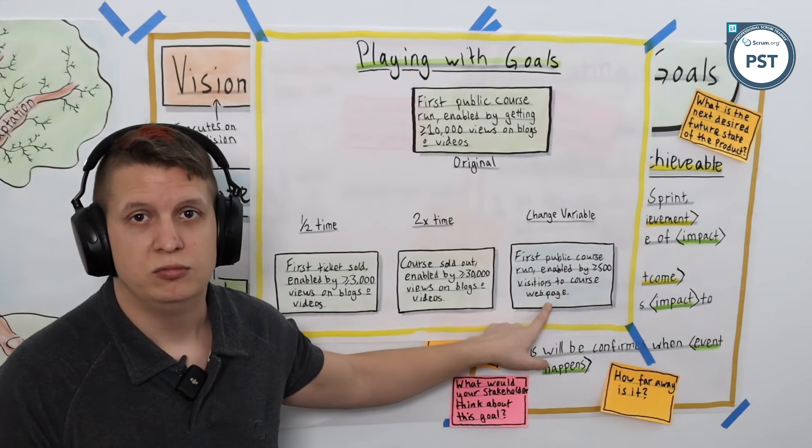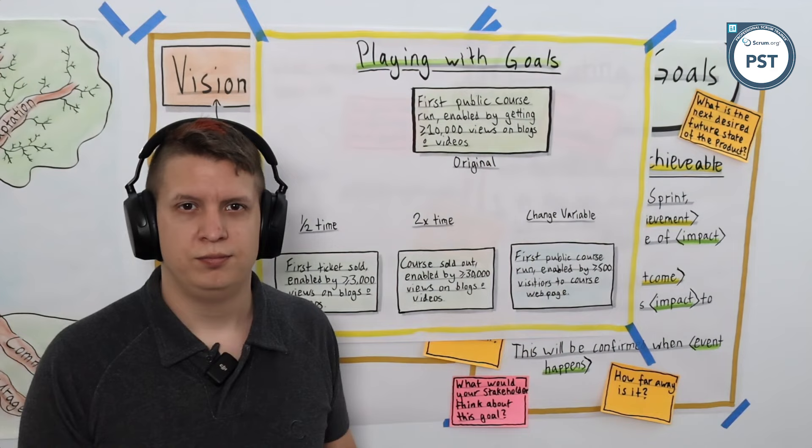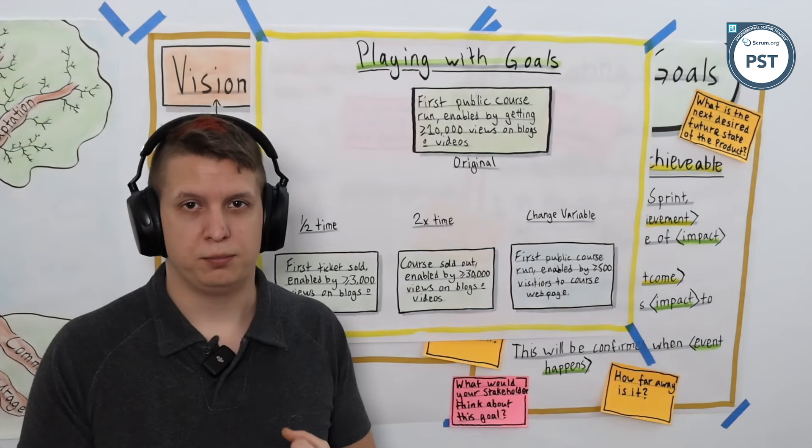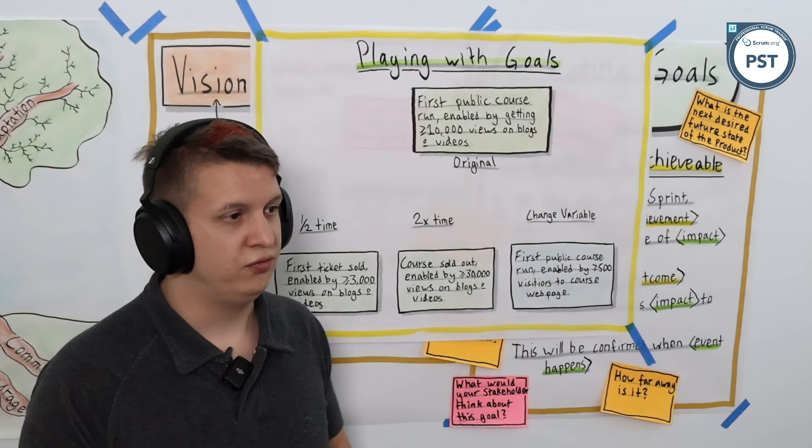This one does not. We could still be doing that, that could be part of the strategy, but it might not be the whole picture. So depending on how you tweak and play with your goals, be they sprint goals or product goals, you will change the items that get pulled into either the product backlog or sprint backlog.